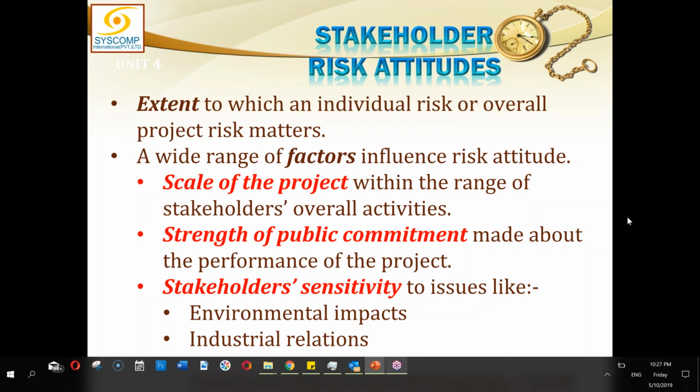To the stakeholder. You see, we are doing this project for the stakeholders, which include the customer, which include other parties. So all those people who are involved for this project, they will determine how much risk they can bear. So their risk attitude has to be determined first, because all the risks are identified according to that criteria. So we must understand what is their risk attitude. Maybe, as I said, in Saudis, they probably, in their attitude, cost doesn't matter. In another place, time may not matter.